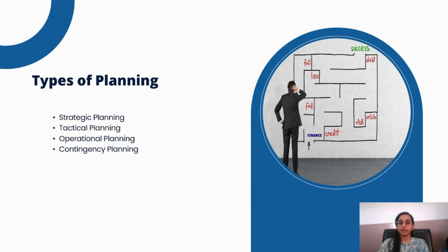For each identified risk, a specific contingency plan is developed. This plan outlines the steps to be taken before, during, and after an event to manage and mitigate its impact. This includes defining roles and responsibilities, communication protocols, and recovery strategies.